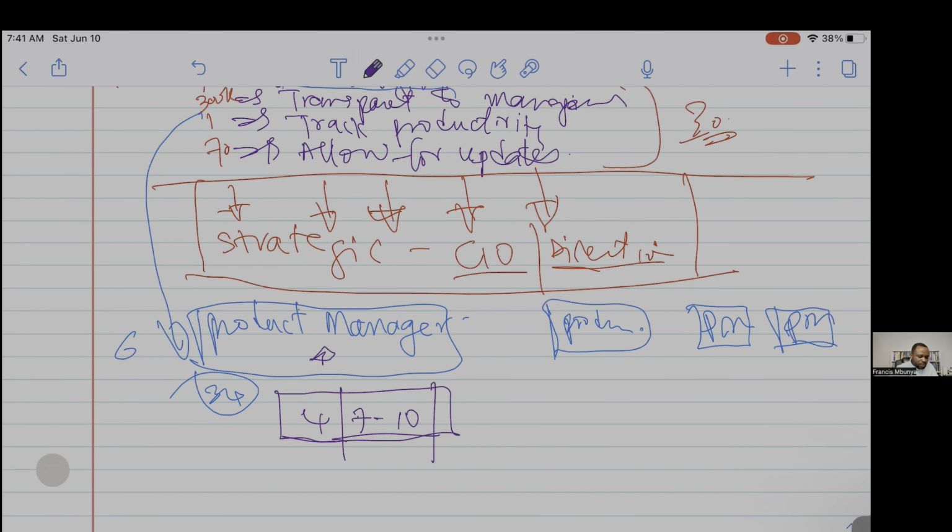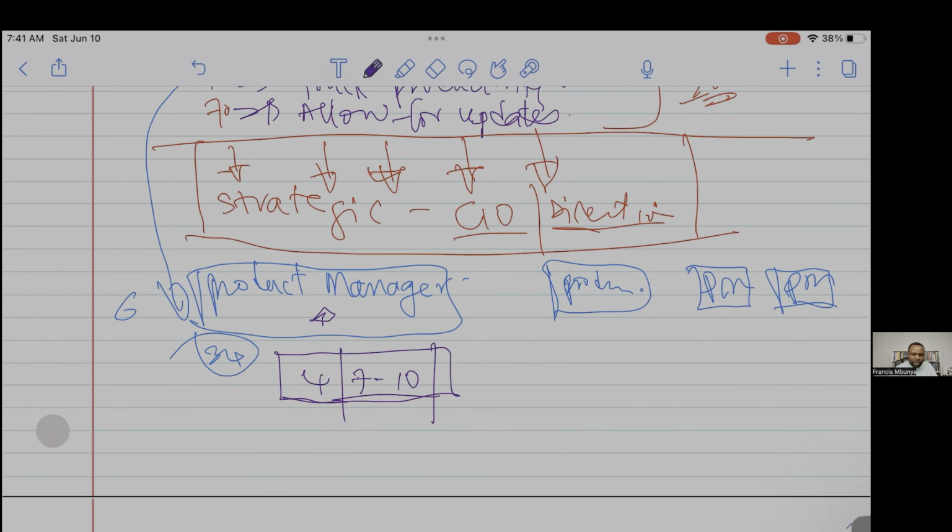Now you realize that just by this thinking, they already are planning, right? This is already release planning happening here. I need to get this out within 6 months. So what do I need? I need a capacity of 34 people to get this out, which means I need about 4 different teams if we're delivering this by Scrum. Now, I can also do this with a Kanban team. In this way, I might not need up to 4 Scrum teams. I might just split it into 2 teams and have 16 people on one team and 16 people on the other team. Right. Now, this is management making their decision on what they need.